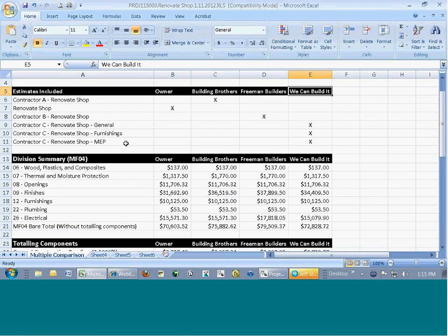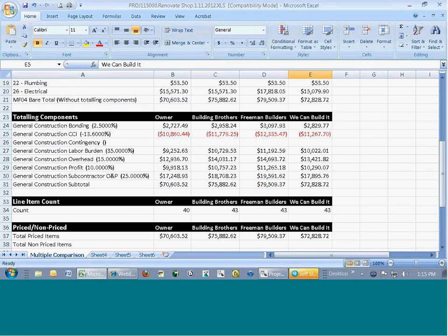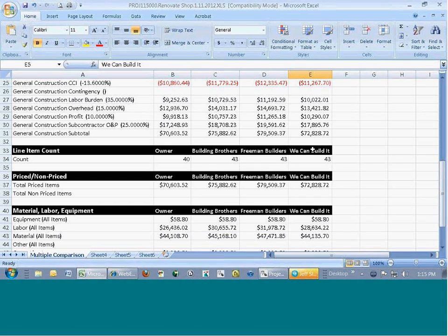So our first stab at it was at what we call the division level, the buyout level, the front page. But what you'll be able to see is we've got all the divisions, because you know what, Bill, we don't want to have a contractor kind of sneak something by us and win the contract with the lowest bid and come back and hit you for change orders. So what's neat about this is you can immediately identify that he or she might have forgot a particular item, a particular CLIN, an add, or a section inside the estimate. And that's what I'm presenting right here, is it's very quickly letting me know that most of the contractors pretty much have the same exact quantities.